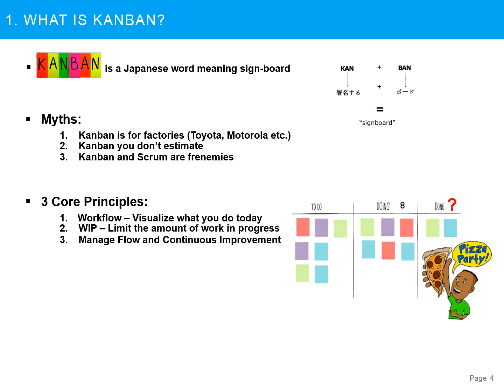So coming to the next principle, manage flow and continuous improvement. This is also called enhancing the flow. So when something is finished, the next highest thing from the backlog is pulled. So Kanban promotes continuous collaboration and encourages active ongoing learning and improving by defining the best possible team workflow.